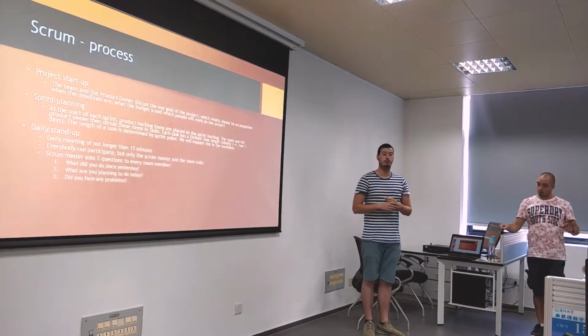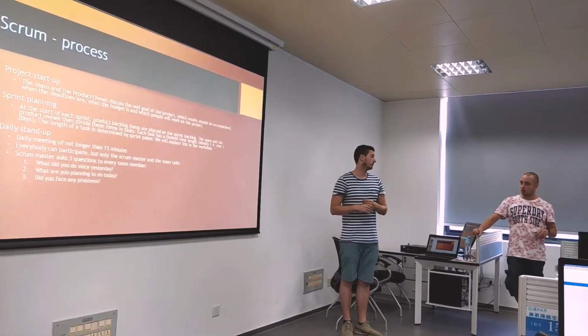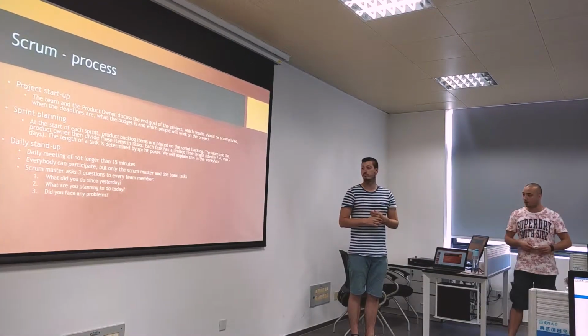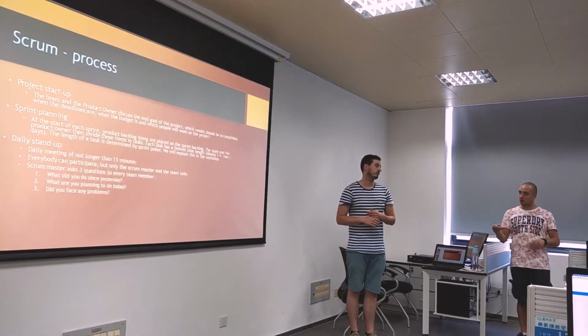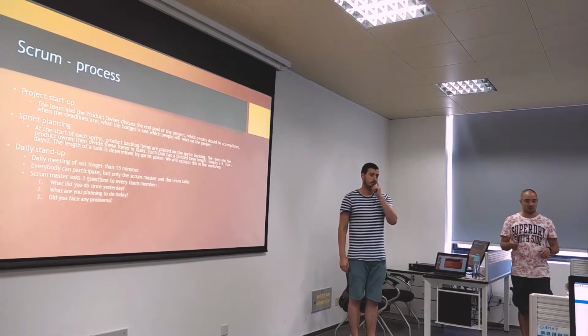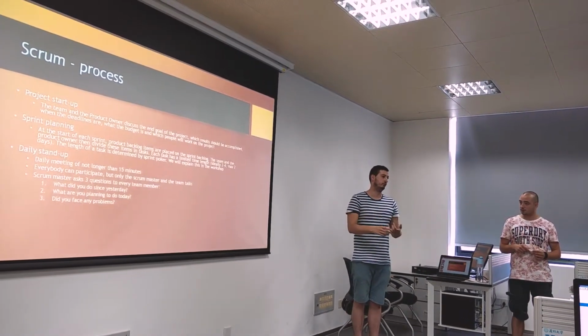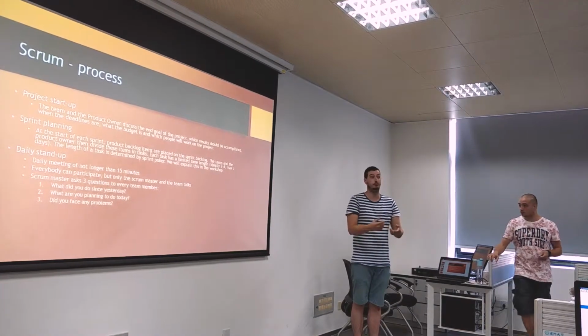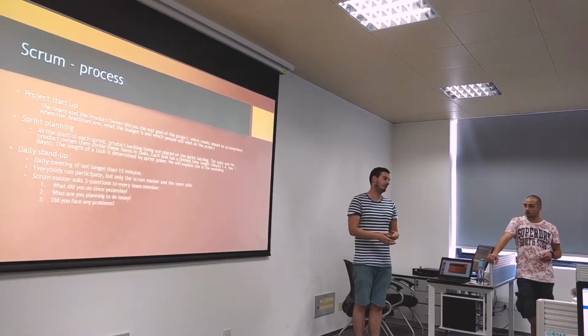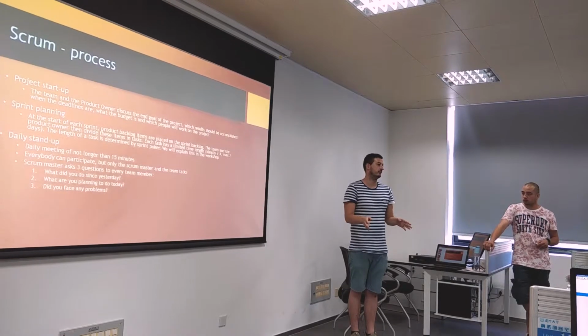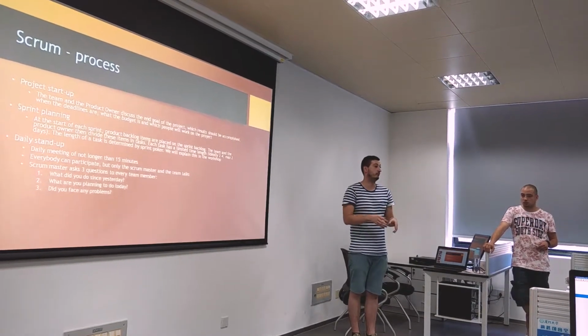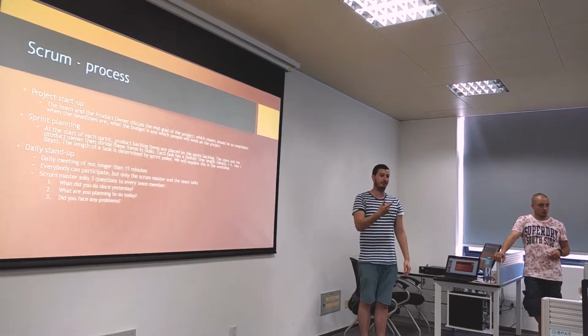If there are problems, the Scrum Master will solve them, but not during the daily stand-up, but after that. So the daily stand-up is for information only. What did you do yesterday? What are you going to do today? Any problems? And that's just it. So everybody knows what everybody is doing, and you can continue with your work.